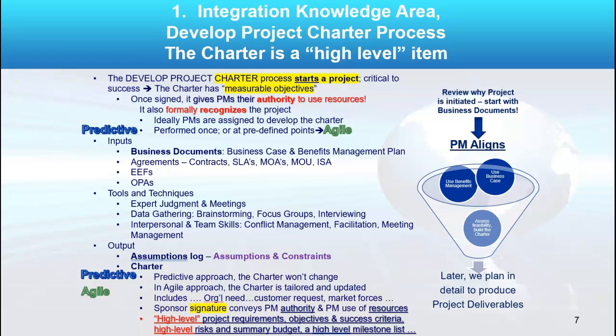The charter is determined once up front for a predictive or waterfall project, and if it changes, you frankly want to probably recommend to your sponsor to terminate the project, right? It's that big a deal. But in agile, it's performed at predetermined points, probably at the beginning of each sprint, for example.